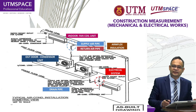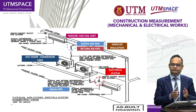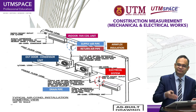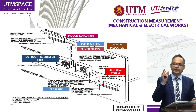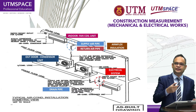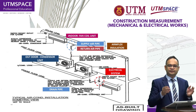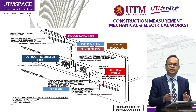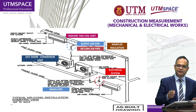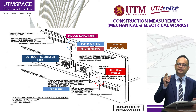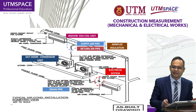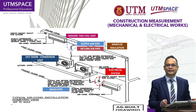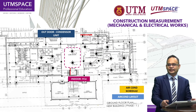We also need an electrical system. As discussed in Module 2 on electrical installation, we have a distribution board (DB) to provide a socket outlet for the air conditioning installation. This socket outlet is normally already considered in the electrical installation. However, if you do not have the drawing, you need to assume — as a contractor or design consultant — that one electrical supply point is needed to operate the condenser unit.